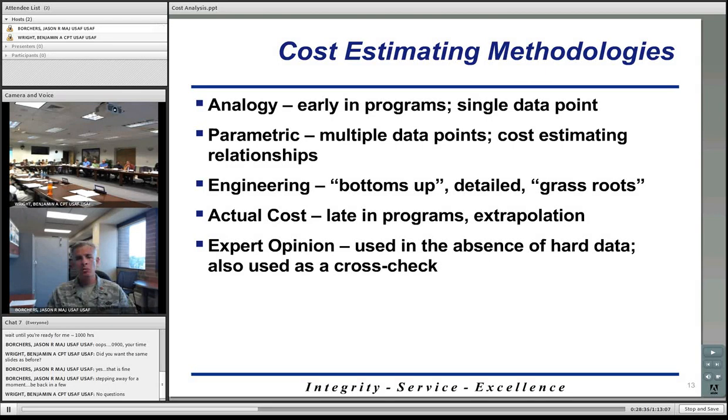You now have two ways to estimate something. You can compare the estimate that each of the ways comes up with just to make sure that they're in line with one another. If you come up with roughly the same estimate using both methodologies, you can have fairly high confidence that your estimate is pretty accurate. If you come up with two totally separate numbers, then you may need to go back and take a look at what you've actually estimated and how you estimated it, because there might be more detail involved in order to come up with the most accurate estimate.